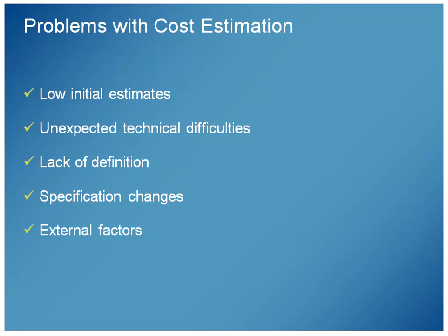It's not ethical, it's not the best thing to do, but there is almost a corporate culture that rewards underestimating, or at least when it says this range is going to be somewhere between $8 to $12 a unit, let's go on the low end for our initial budget, because you've got to get approval before the project can get going, and low initial estimates can help with that approval. But then, it's a double-edged sword. Once you get it approved, then you end up running over budget, and that's not a good thing. But having a successful project, even if it's over budget, is more beneficial to a project manager than not even getting to manage a project because you were too honest with your budgets up front.